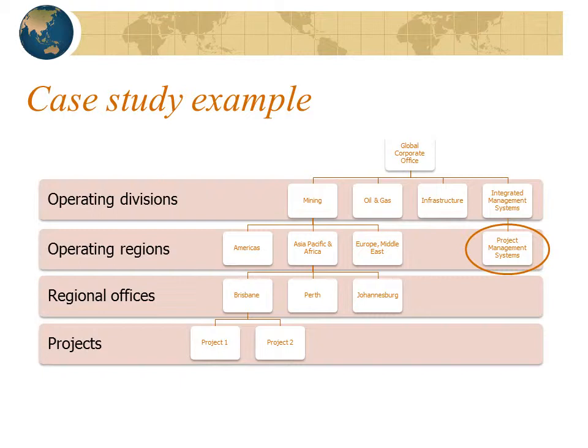It is not responsible for providing more general project management support, and it does not play a role in the development or application of the project management guidelines. So here you can see the Project Management Systems Group basically interacts directly with the project when the project is first initiated. It aids them in configuring the software for that project, and it provides ongoing training and support, but only for the project management software system.